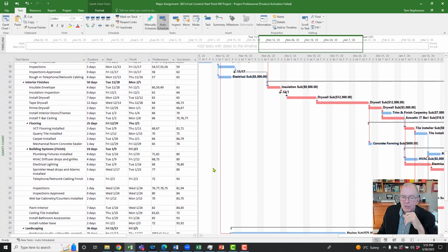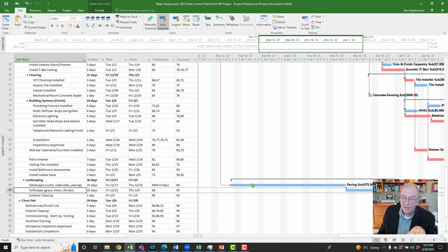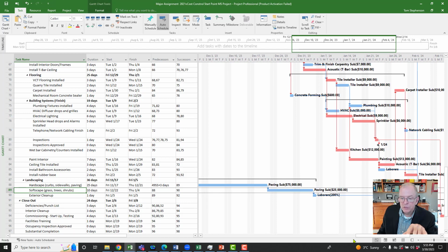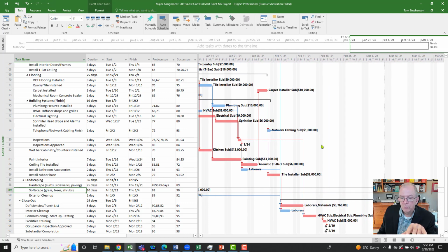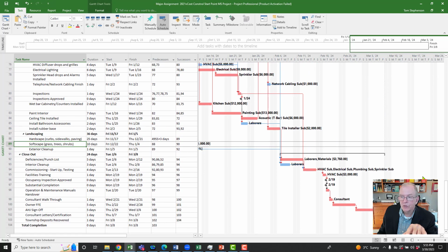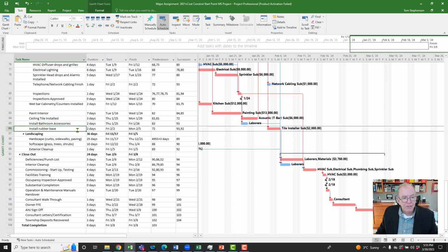Or you've got to look at, can we delay this part? Because you're getting close to March. Is it okay if the grass, shrubs, and stuff goes in at the beginning of April? Beginning of April we can do it, but not in March even. Right now it's March and I see snow outside. So that's not the best timing.